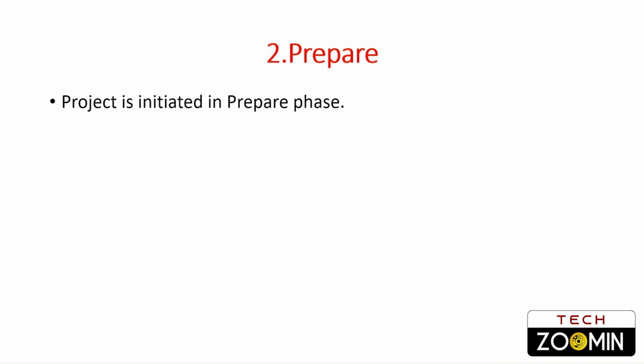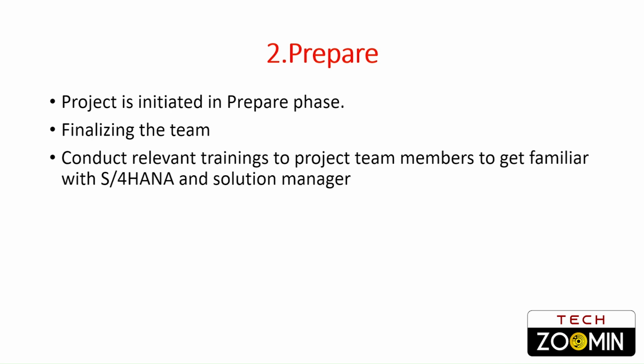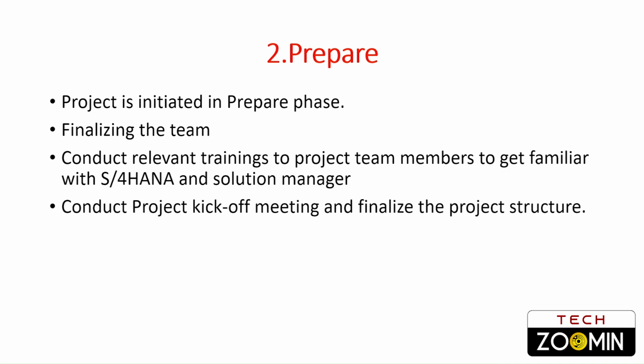In this phase we finalize the team, and trainings are conducted for project team members to get familiar with SAP S4HANA and Solution Manager. For this they will provide access to the SAP portals, and they should make sure all the project members get access to SAP related portals like the SAP Support Portal and the SAP Best Practices Explorer. And a kickoff meeting is conducted.